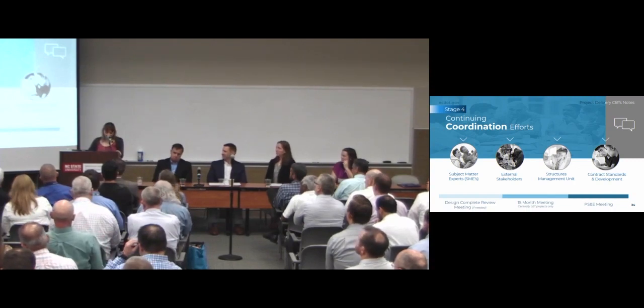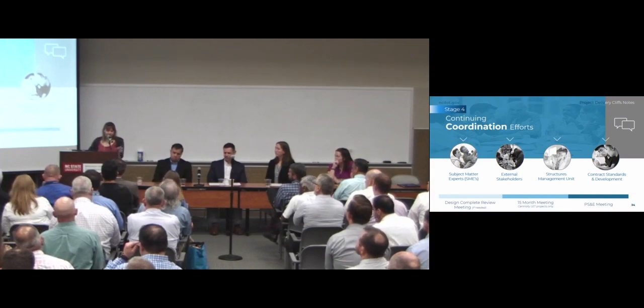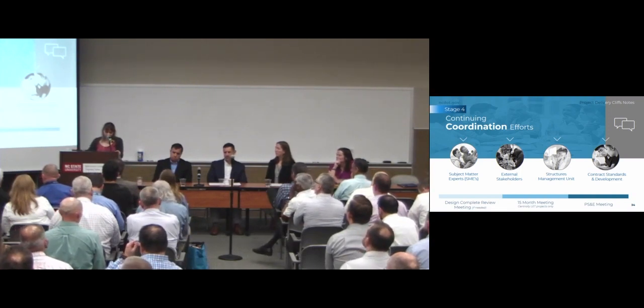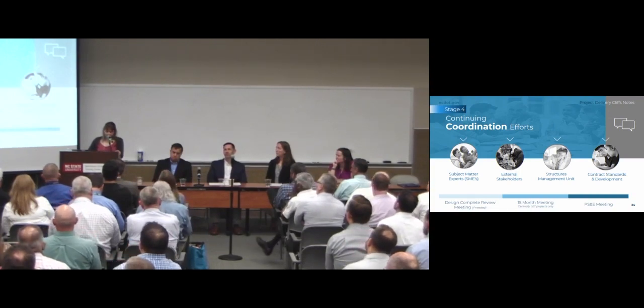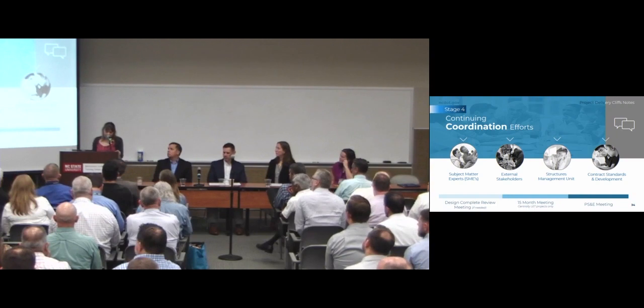And so typically this happens at the end of stage 3. It's basically a big plan review that we all need to do to make sure there's no conflicts and fatal flaws. So during stage 4, we need to be making sure that we take these comments and we're addressing all these comments. This is highly recommended for larger, more complex projects.